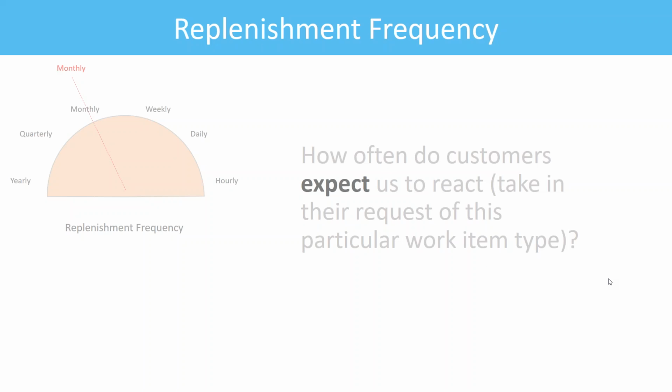Another question is that I think it's a great sentence that you have used earlier as well. I've seen that lead time is not a number, but a probability distribution. That means that when you're trying to make a commitment on lead time, you've got to have the data, and you've got to have the probabilistic curve of what are the different thresholds of lead time at different probabilities. I would assume that this would mean that you already have some way to capture the data for your past performance, and then being able to do this. Now, do you?